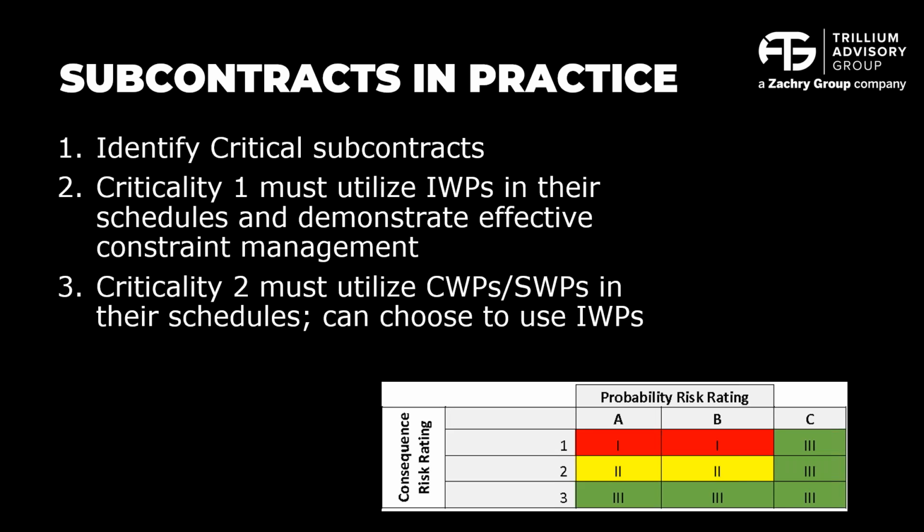We actually assigned several planners to support them. We recognized that AWP is new to the industry, or newer to the industry, but especially into subcontracting and engineering. So the only way you're going to make this work is doing that investment up front and actually assigning some planners to work with those subcontractors. We worked with the various subcontractors to develop their schedules and start them in their journey.